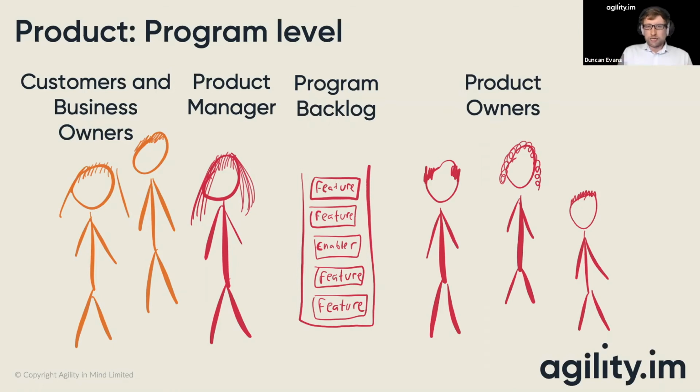And in many cases, that is the essential level of SAFe that people work with. At a very basic level, SAFe is all about scaling up individual Agile teams. Often the first step is going from having single product owners managing one or two or three teams to having a product manager in place who's coordinating across, in SAFe, this structure called an Agile Release Train, this virtual team of teams, which is essentially the basic level of planning in SAFe.